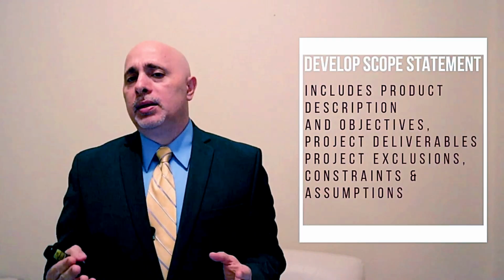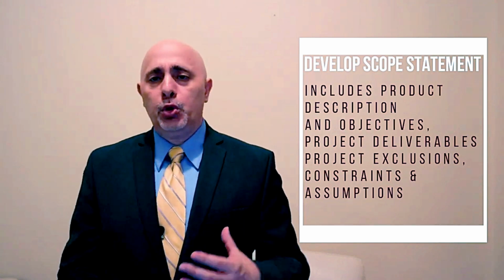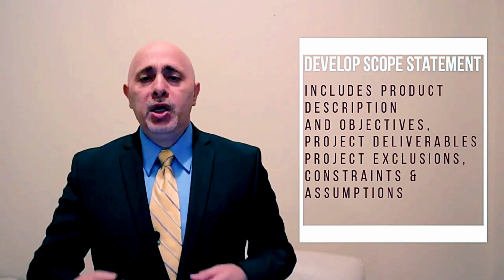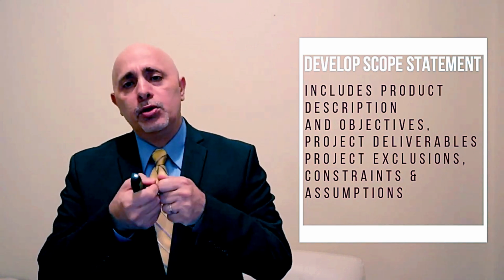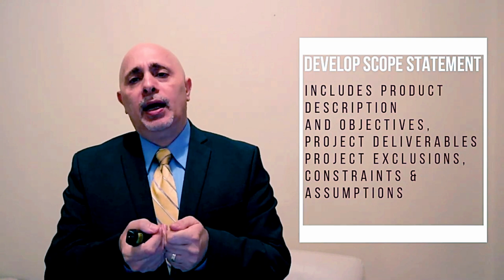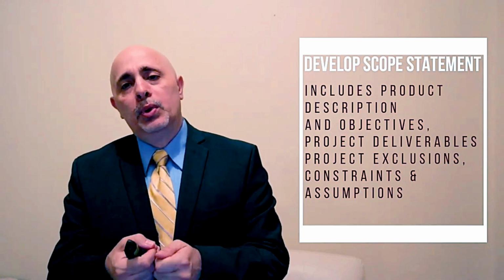and that's to develop your scope statement. The scope statement talks about what the end product is that you're going to be delivering and what else you're delivering with that. Are you delivering some coaching, training? Are you delivering some technical manuals along with it? What are you going to hand over? Those tend to be bulletized in the scope statement. The scope statement can be turned in with the list of requirements in order to make it more clear.